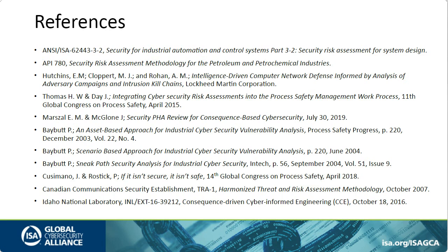The detailed level risk assessment is going to require a certain amount of front-end engineering work to be done. But as soon as you start getting that scope put together, you want to be trying to do that detailed level risk assessment, once again, as soon as possible.